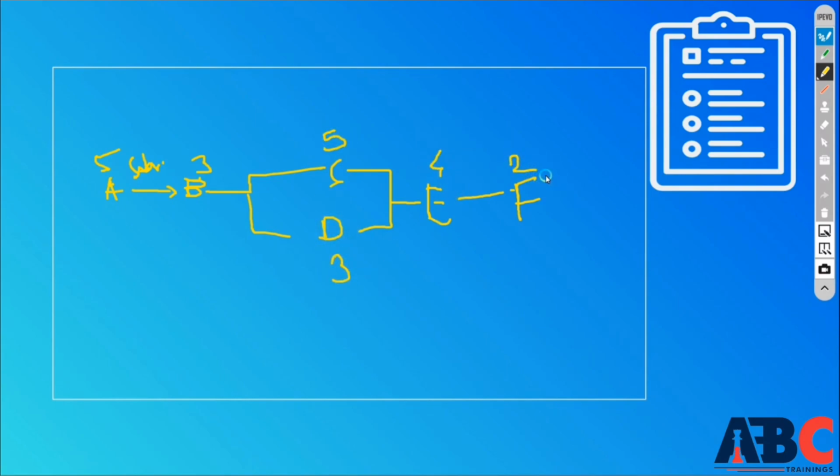If you look at this diagram, if my A activity is over, then my B activity will start. After B activity is over, my C and D activities should start immediately. But suppose for some reason my D activity is not started, because on the day those resources are going to be used, C is available, but resources are not available for D. So I started the activity late.